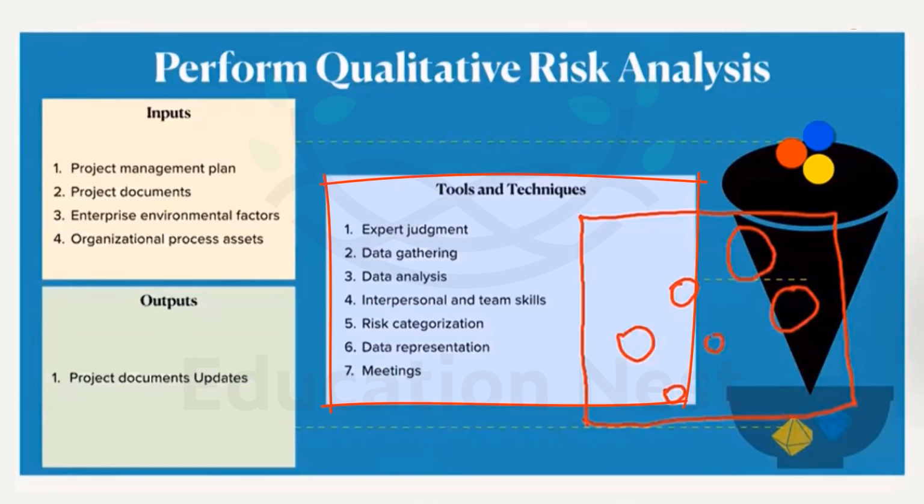And what are these boxes here? On the left, we have the proximity, how close we are to this risk. And then this is nothing but the detectability: how easily can we detect that this risk is going to happen? The larger bubbles are quite unacceptable, which means the impact of this risk is very, very high.